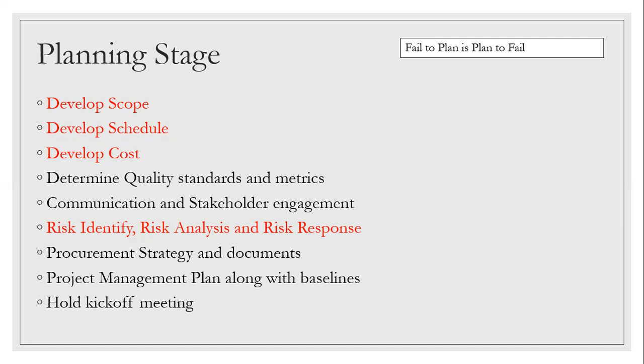In planning, you're developing scope, schedule, and cost. Certain statements are marked in red on the slide because these are the critical things — if they're not done, your project plan is definitely not completed. Quality standards also have to be defined: quality assurance happens in the planning stage, and quality control comes in the monitoring and control stage.